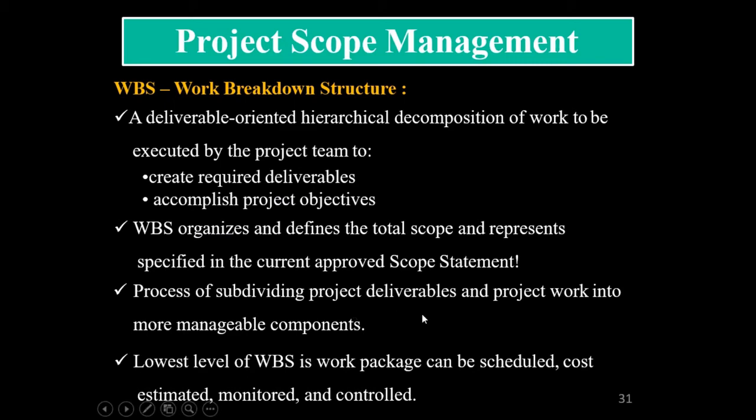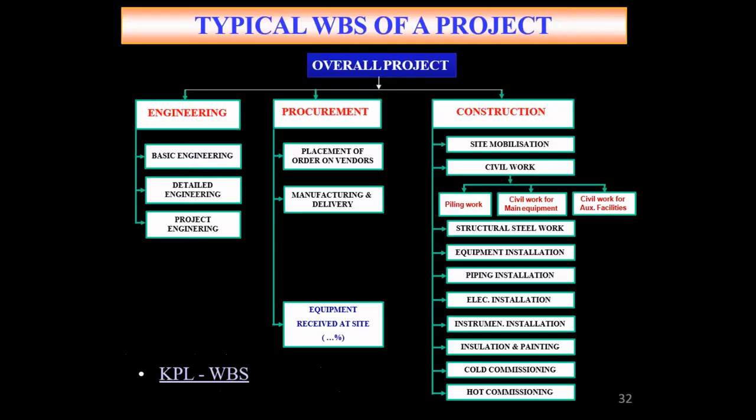So management becomes easier with the work breakdown structure. Scheduling, estimating the cost that is required for excavation, for example, monitoring and controlling can also be possible. For example, if excavation takes 4 days, is it possible to reduce the excavation days? Yes, it is possible. So increase the labor like that.